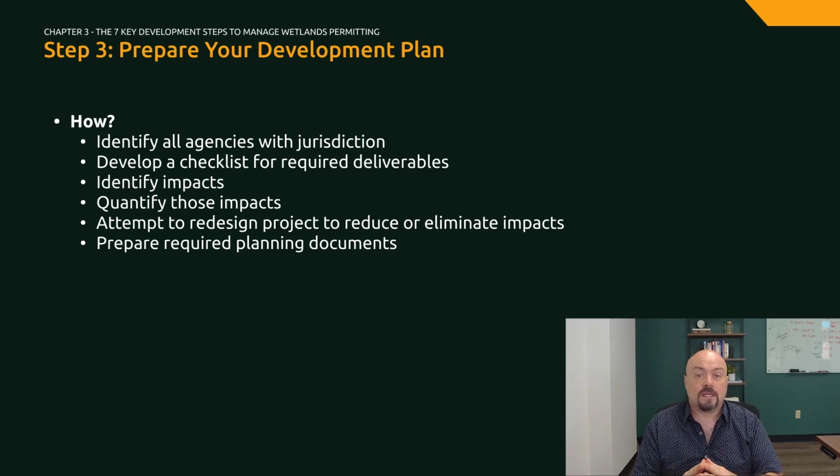For example, if a county requires a 50-foot setback from a stream on your property, you may be able to prepare and implement a stream management plan that reduces the setback in exchange for additional site improvements. Last, we recommend reviewing all improvements in the vicinity of your proposed project to make sure that they are permitted.